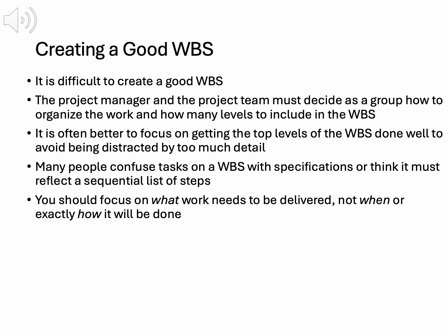Start with major deliverables, like needs assessment or course development, then break them into work packages, like survey administration. This top-down approach ensures a logical hierarchy without excessive granularity. Avoid common mistakes, like confusing deliverables with specifications or sequential steps. The WBS defines what work is delivered, not how or when it's done.